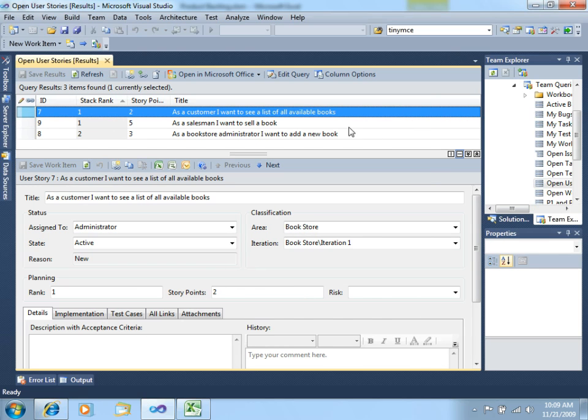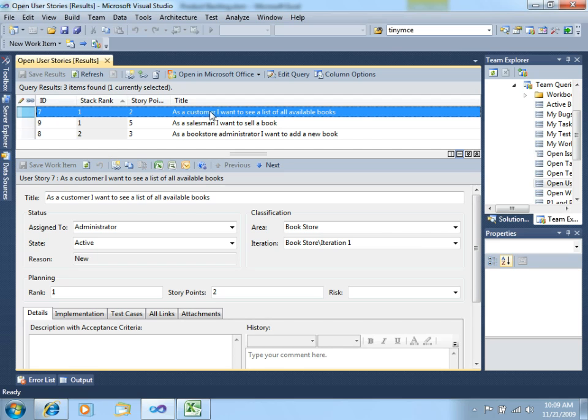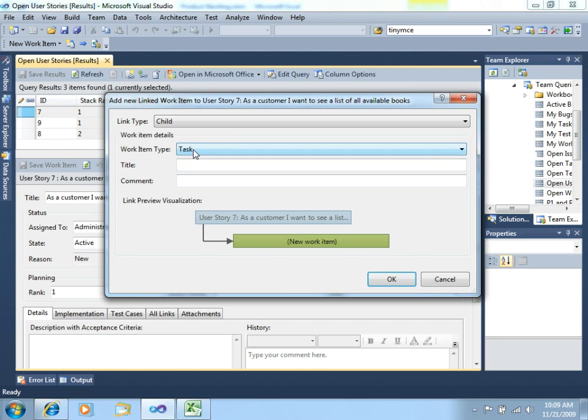So, now, once you have the User Stories stated, you should also create the developer or the team's tasks that will give more detail to what has to be done in order to build the product to accomplish with these User Stories. So, in order to do that, let's go for the first one. As a customer, I want to see a list of all available books. So, in order to create tasks for this User Story, we will right-click here, and let's say, new linked work item. We will create a child work item, the kind of a task work item.